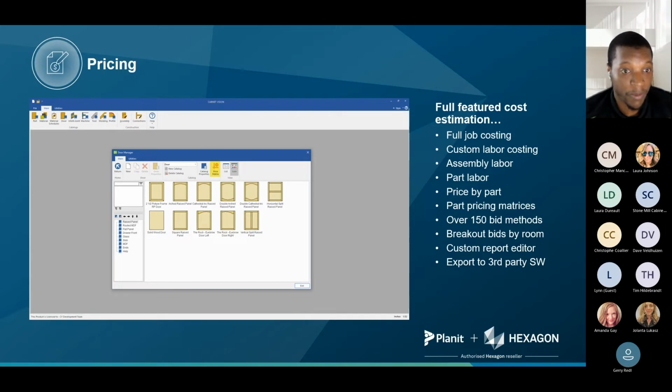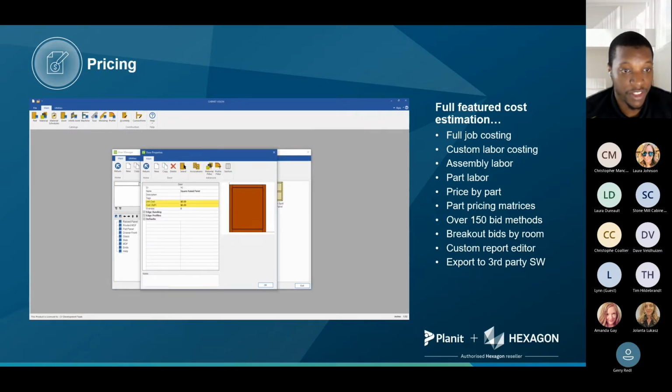Also, for example, a minimum price. So it's really common in the industry. If you buy doors, you may know that they will sometimes charge a minimum of 1.5 square foot for any door you will order. So if it's a small drawer front, they will still charge you 1.5 square foot. So CABINETVISION has those parameters that you can set on each door. What is the minimum cost per door per square foot, for example? And this is attached basically to each door style. So you get a line where you can input your cost and your cost per square foot as well here.